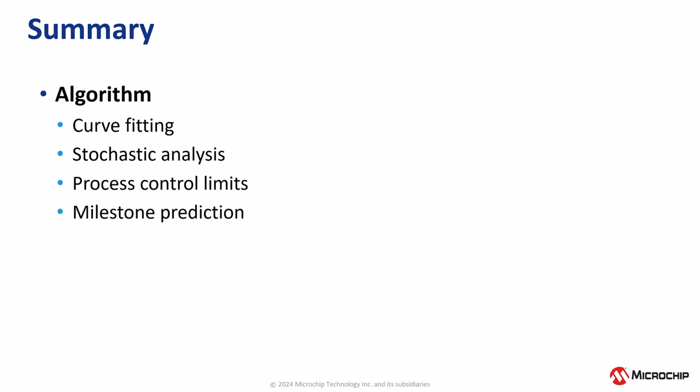Curve fitting techniques were used. The best curve was selected by reviewing the initial milestone value, the negative slope, the value of rho squared, and whether the curve crossed the x-axis. Using stochastic analysis, both control limits and confidence information were calculated. The control limits were plus or minus 1, 2, and 3 sigma. When the new data point exceeded the plus or minus 2 sigma limit, an action plan was generated. If the new data point exceeded plus or minus 3 sigma, the action plan was executed.